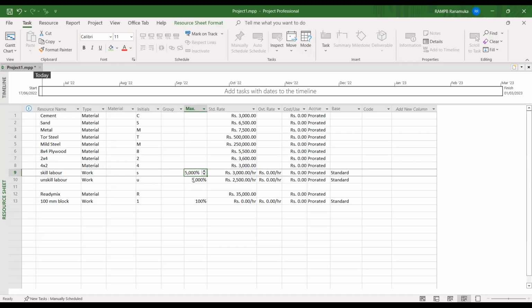But I know according to MS Project, the maximum available labors for this company is only 50. So if I have 50, I can't allocate all 50 at once for a number of jobs. Automatically MS Project identifies the resource shortage and gives that identification as a resource allocation or resource limitation. Based on that, we can increase the durations, or if we have more labors, we can reduce the duration. Likewise, we can do that.